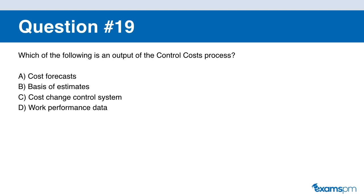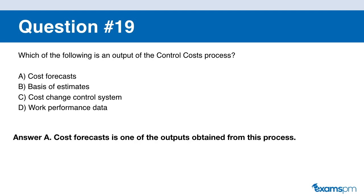Question nineteen. Which of the following is an output of the control cost process? A: cost forecast. B: basis of estimate. C: cost change control system. D: work performance data. If you said A, you are correct. Cost forecast is one of the outputs obtained from the control cost process.